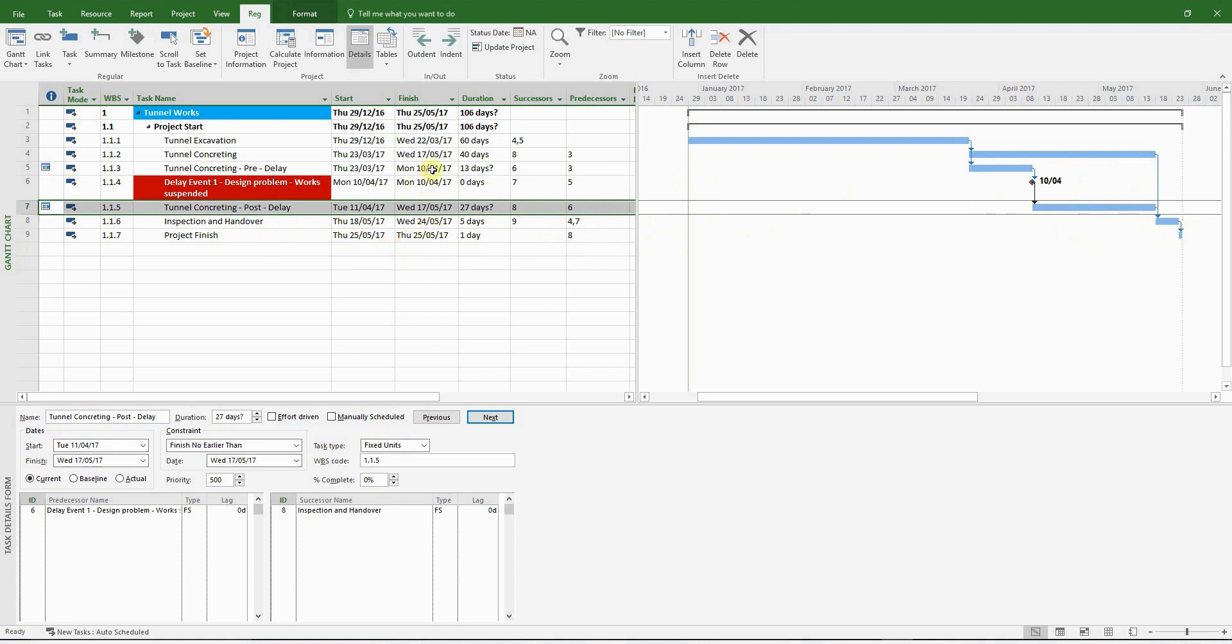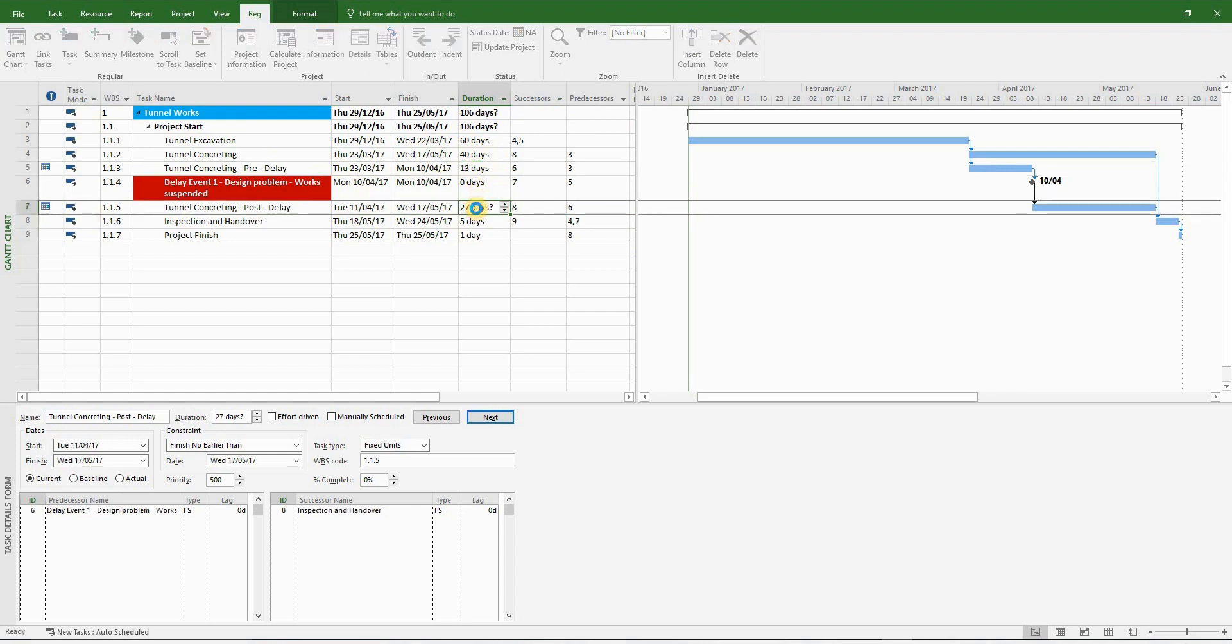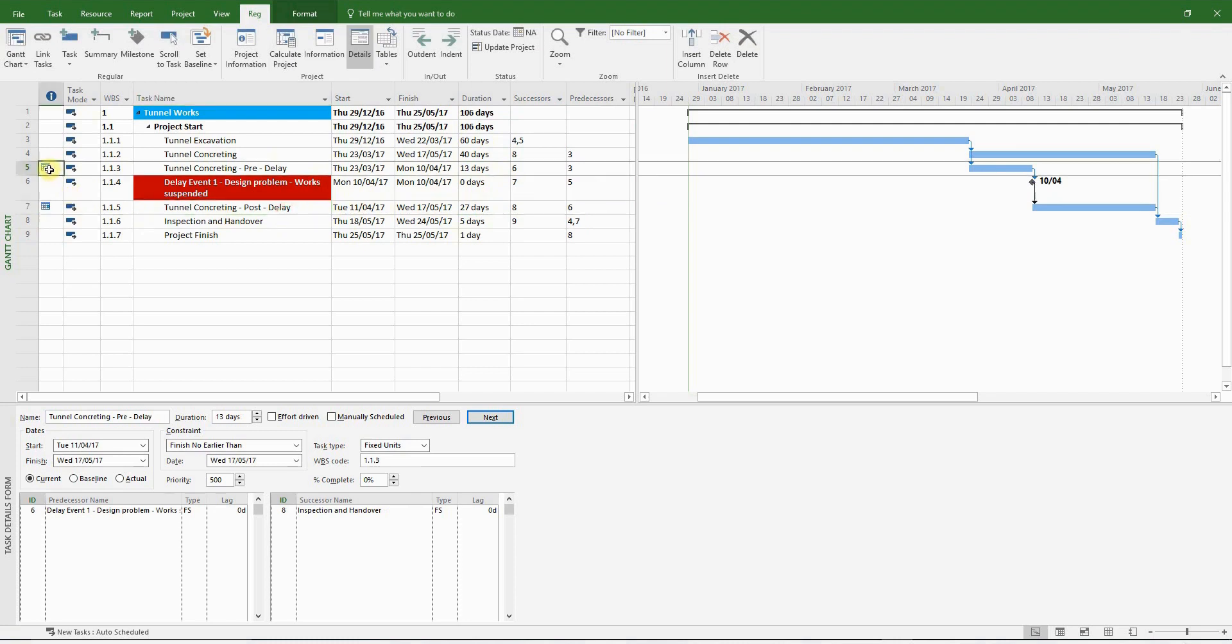Next, please check that the original start, finish, and duration has not changed. This is a very critical check. Next, modify the estimated durations to actual durations by typing in 13 days and 27 days.